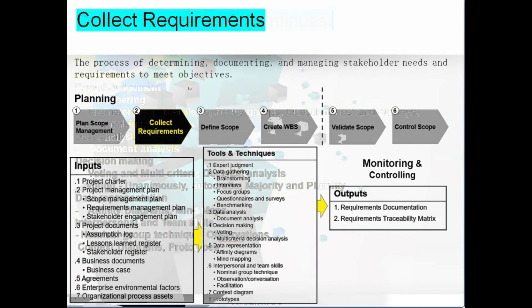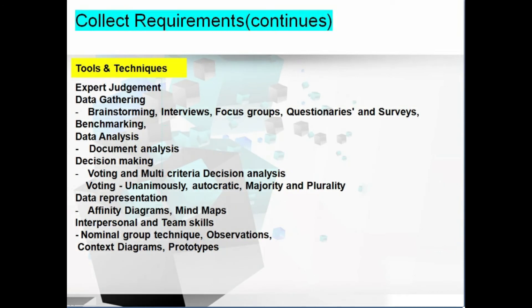Moving to tools and techniques, starting with brainstorming: the purpose is not just to get individuals to share thoughts, but to encourage participants to build on each other's ideas — a simple way to gather all ideas. Interviews can take place between two individuals or in group settings, via phone or virtual collaboration tools, and can also be referred to as expert interviews. Focus groups are sets of stakeholders or subject matter experts (SMEs) that provide actual scope input, directed by a moderator.